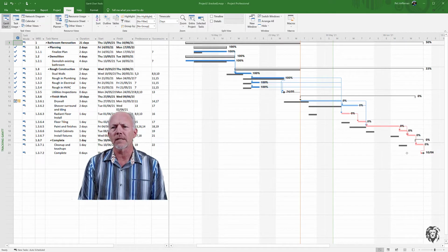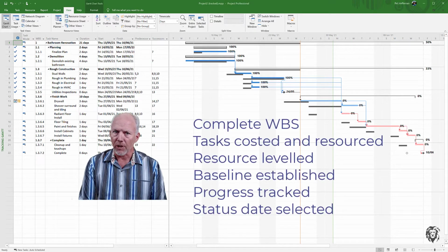So what does Microsoft Project do for us for earned value? Well, first off, we have to make sure that our project is in the right spot. So we've got a project, we've completely filled out all of its tasks with all of the estimates associated with each of those work packages. So we've got cost estimates for each of those packages. We've got time estimates for each of those packages. And then at the end of all of the planning process, we set our baseline. You have to have set your baseline on your complete project in order to start looking at earned value.